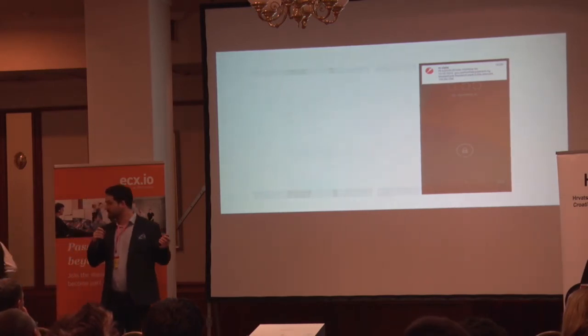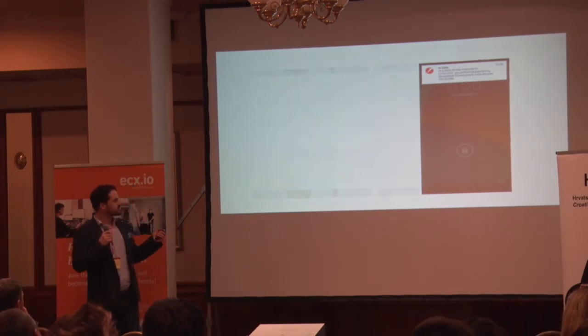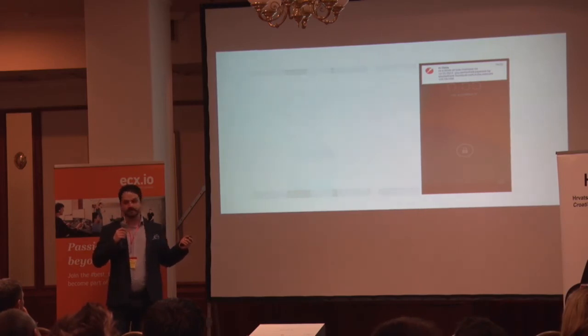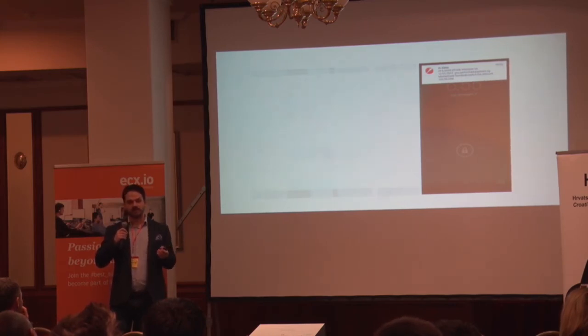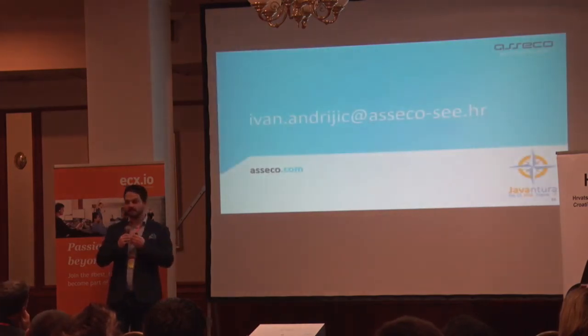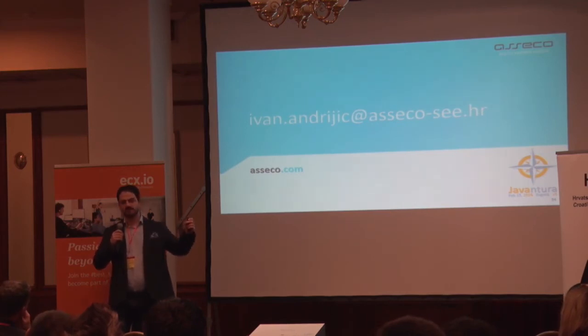And this couldn't be done if we used the waterfall model. Why? Because we were working with our client all the time using the Agile methodology. And to our sponsors, we were presenting information using Microsoft Project. And how do you do that? We use Sprint to write down our tasks. And whenever you add a task, assign it to a specific milestone within Microsoft Project, so you can manage it.